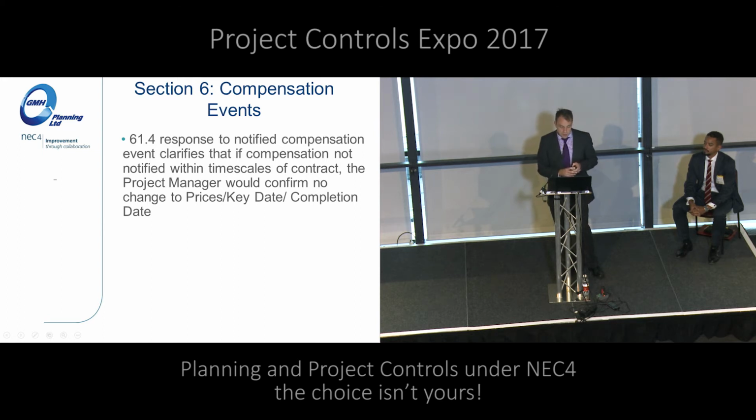61.4, responses to notified compensation events, clarifies that if the compensation event isn't notified, the project manager would confirm no change to prices or completion date. That's a point of clarity.